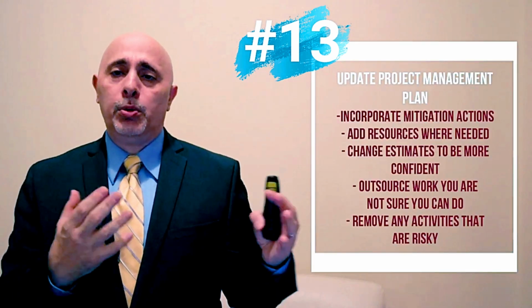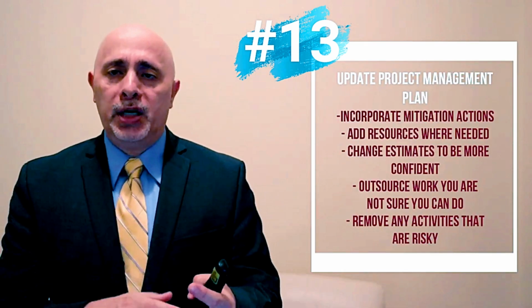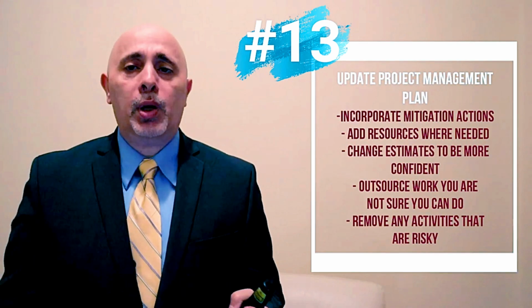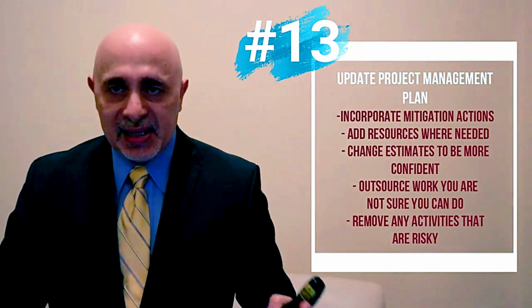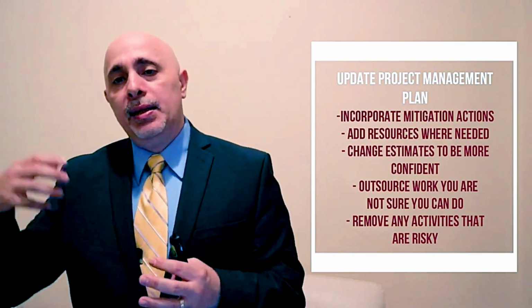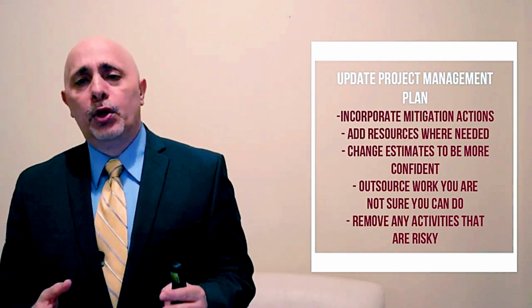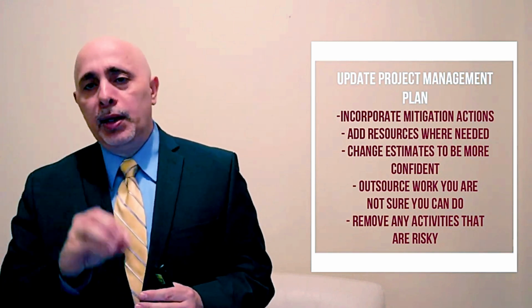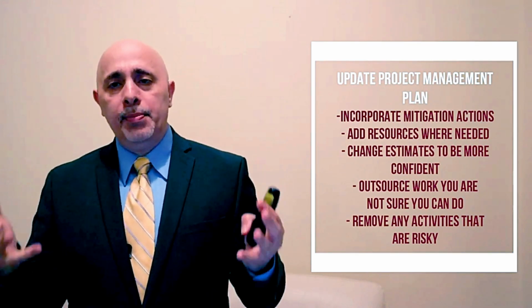Step number 13 is to update your project management plan with all these mitigation actions. You want to make your project management plan, your scope, your budget, your schedule, your requirements, you want to make them more likely to succeed. And so you're going to change them using the mitigation actions that you came up with. So your mitigation actions need to be added into your project management plan and modified.